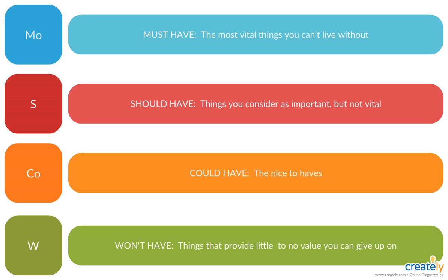But again, you could really make a mistake. For example, if the first thing you start doing is putting in floors, and it's a tropical rainforest, so you're going to get rain and it's going to destroy the floors. So you need that extra layer of information to order these must-have items, so that you put up four posts first and then put the roof on top of that. And then you can start building the floor and the walls while you're dried in. So that's the idea of ordering within the priorities.